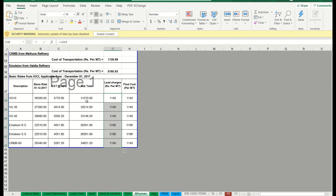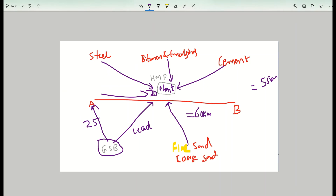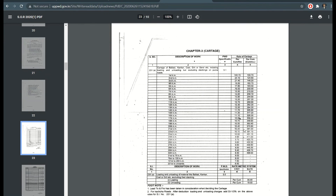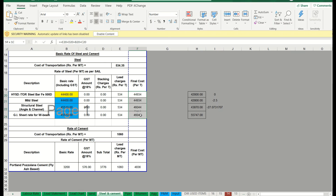Otherwise, if your rate analysis itself is wrong, lower bidding may occur and that will create a serious problem. Rate analysis is a very important tool. First, calculate the lead distances. Then prepare a lead chart for each specific material showing how much distance. From the Schedule of Rates, calculate the total lead cost. Once the lead chart is prepared, create a separate sheet for each type of material — sand, cement, steel, pipes — and link the total cost to the cost estimate file. Only then will a proper cost estimate be developed.